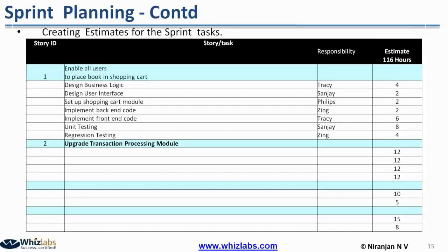That is how the team can do sprint planning, and once the sprint planning is done, they make a commitment. In this case, let us say items 1, 2, and 3 can be done in 116 hours. Then the team will make a commitment of 3 product backlog items in the current sprint. For the next sprint, the situation may be different. That depends upon how much available time is there for the next sprint, and we will know only when we start the next sprint. So we don't have to worry about that.